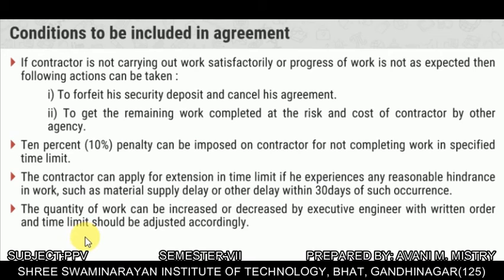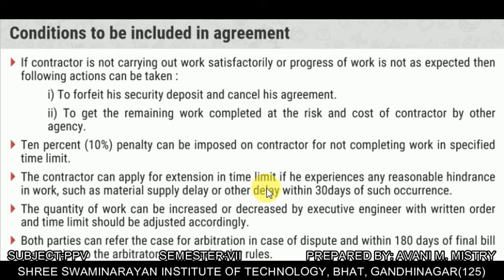The quantity of work may be increased or decreased by the Executive Engineer with prior order, and the time limit should be adjusted accordingly. Both parties can refer the case to arbitration in case of dispute within 180 days of the final bill, and an arbitrator is appointed under the rules.